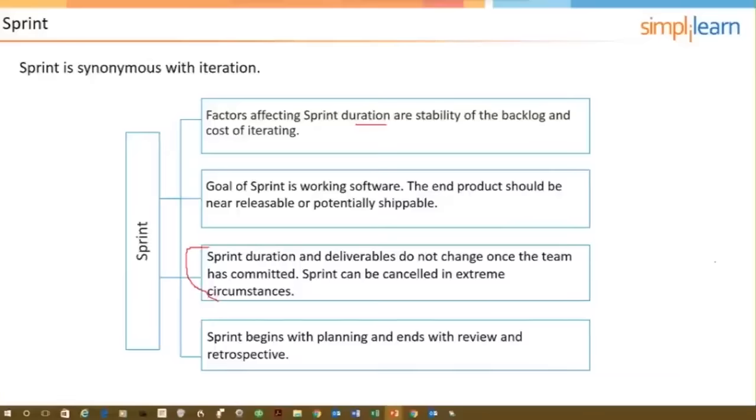Is the Scrum Master going to be there, likely as a facilitator? Is the product owner going to be there? Maybe, maybe not. If the product owner is there, the product owner could maybe answer questions and help clarify. But the product owner does not weigh in on what went well, what did not go well, and what are we going to do differently. That is all owned by the team.